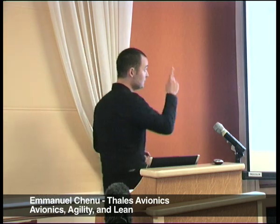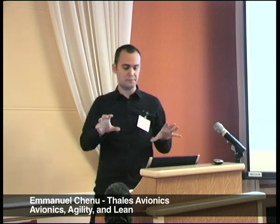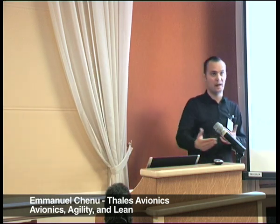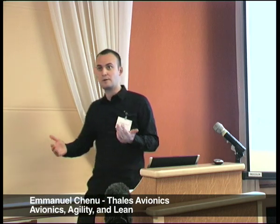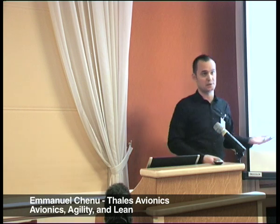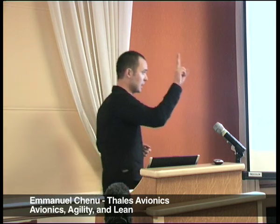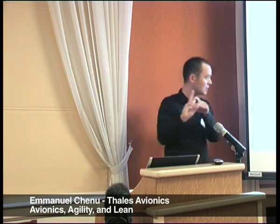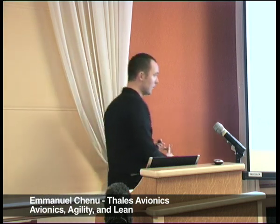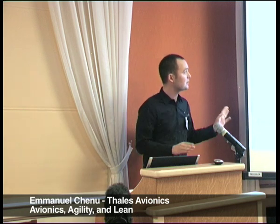For example, desynchronization slows down the flow. As soon as a worker changes something in his own private workspace, he is desynchronized from the mainstream code. And there will be some amount of work to push his changes into the mainstream product. This effort is generally called integration. We minimize desynchronization and integration thanks to two agile methods. First, we practice Scrum's daily stand-up meetings. They are short, daily, time-boxed, focused team meetings. They're time-boxed to 10 minutes tops.